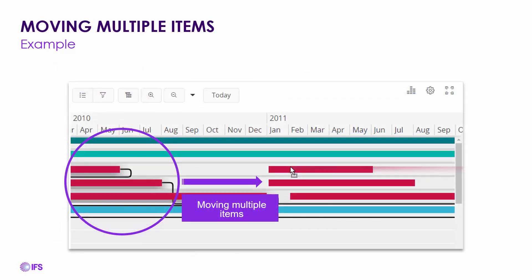You also have the ability to select multiple items from your Gantt chart and move them as a group. Here, I'm selecting three red lines and moving them further out into the future — I can move them all together. There are also additional functionalities within the Project Gantt chart that require parameters to be set up in the page designer, which correspond to those light purple boxes mentioned earlier.